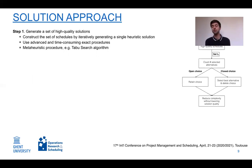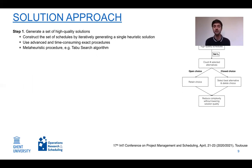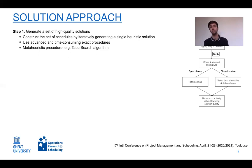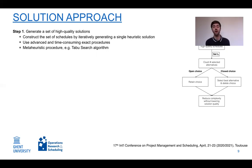The solution approach consists of four steps. First, we generate a set of high quality solutions. One option is to iteratively generate single heuristic solutions — easy and fast, but with no quality guarantee. Another option is to use advanced exact procedures, which guarantee high quality solutions but may be computationally demanding.